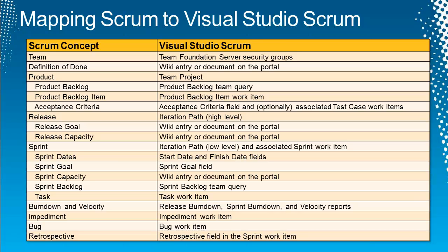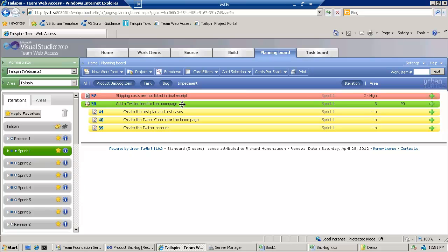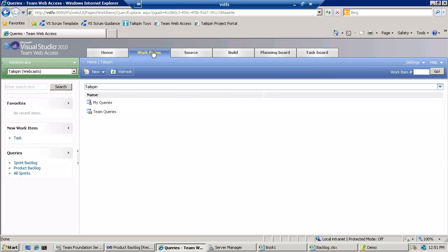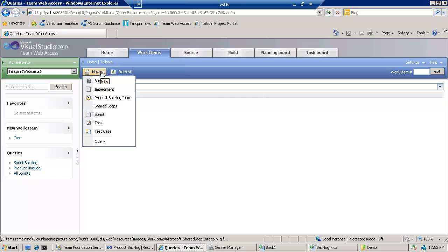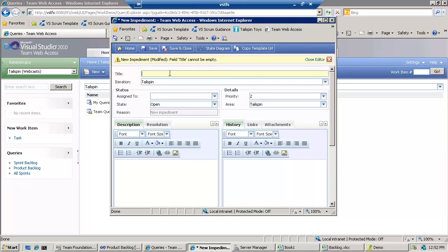Impediments, I think of those as bugs in the process, and they're just something that a Scrum Master might create. You might go to the daily Scrum and someone's talking about, well, my trial edition of SQL Server is up and I'm blocked from doing my work. So that's where the Scrum Master can say, well, let me handle that for you. And a good concierge type Scrum Master would say to install the standard edition of SQL Server for the team.